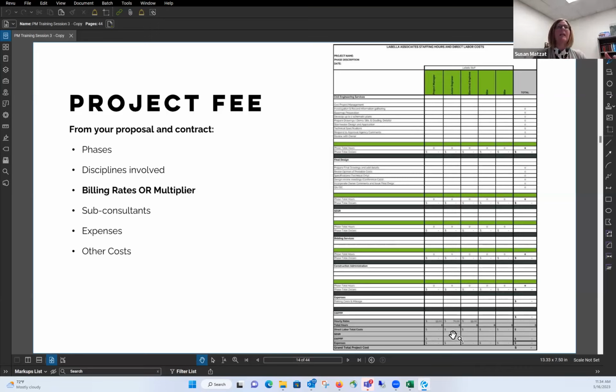And a lot of times in there, there's a clause that says response time in 2 weeks. So we've had issues in the past where the client or the developer said, you're not responding back in time. And so we learned early on to say, look, our response is going to vary between 2 to 4 weeks, depending on what's in the queue and depending on what department needs to respond.